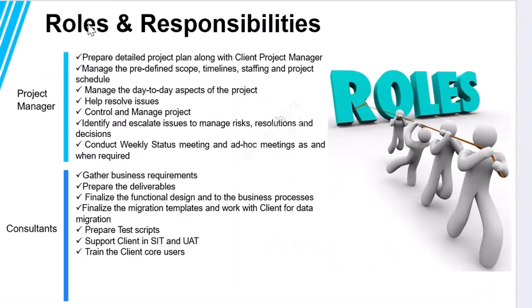Next one is roles and responsibilities. That's your roles and responsibilities, what you will do: a project manager from your end, a consultant from your end. Preparing the detailed project plan will be done by your project manager. Manage predefined scope, timelines, staffing and project schedule. Manage the day-to-day aspects of the project. Help resolve the issues, control and manage the project.